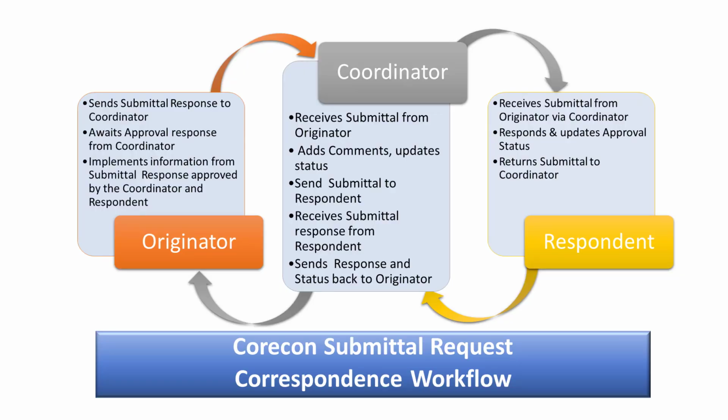This Corecon training video covers the TeamLink portal feature we call Submittals. Submittals are items documented in project specification that need to be provided to the project owner, architect, or CM firm for review and approval. Some examples of submittals are shop drawings, engineering data, material samples, test results, and product literature or manuals. Certain submittals, such as product manuals, are often later used by the client for operational purposes.